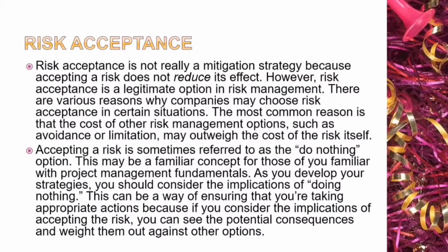First of all, we need to check risk acceptance. Risk acceptance is not really a mitigation strategy because accepting a risk does not reduce its effect. However, risk acceptance is a legitimate option in risk management. There are various reasons why companies may choose risk acceptance in certain situations. The most common reason is that the cost of the other risk management option, such as avoidance or limitation, may outweigh the cost of the risk itself.